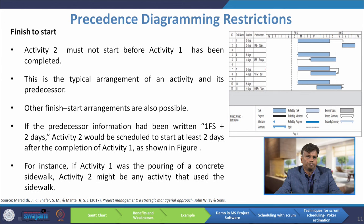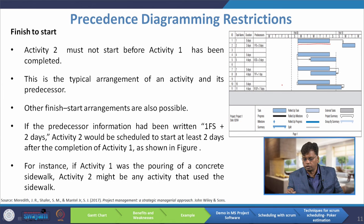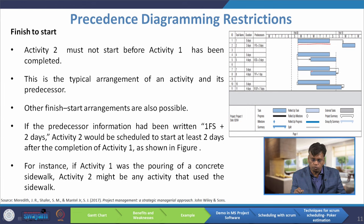The first precedence diagram restriction is finish-to-start. Activity one has five days — Monday through Friday — and after finishing it, activity two will start. For example, finish-to-start plus two days means that after finishing activity one, two days later — Saturday and Sunday — the second activity will start. The arrow in the Gantt chart starts from finish and ends at start, meaning activity two must not start before activity one has been completed.